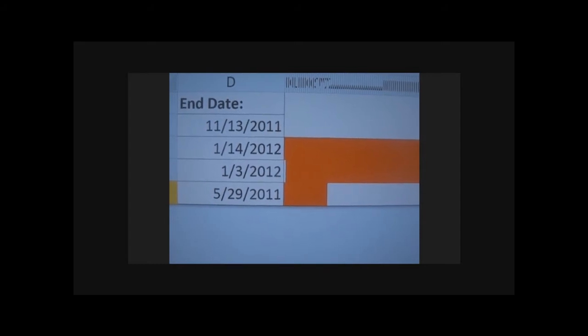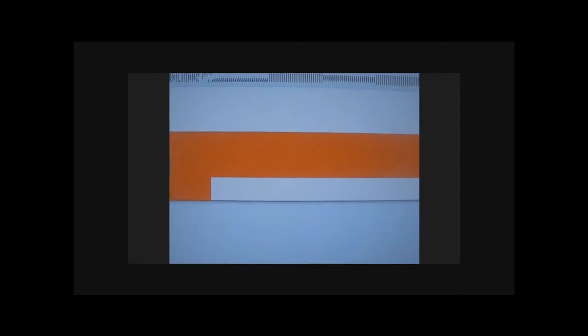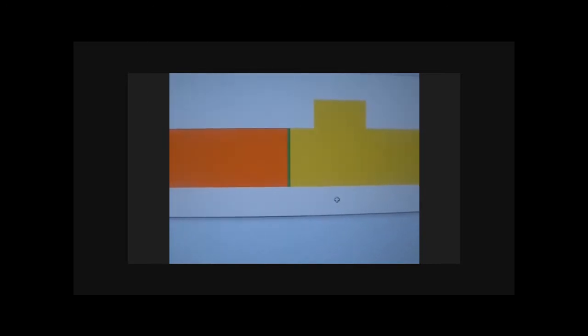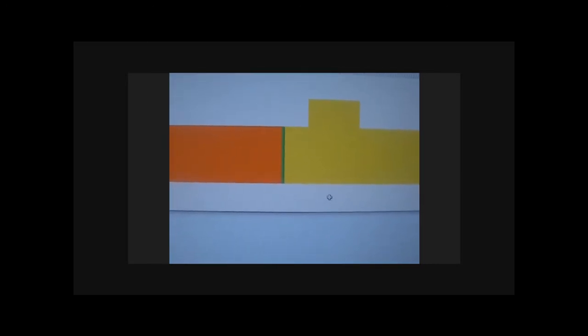When I change those, the coding in the tracker view screen changes. The orange represents past time in the project. That small green line represents today's date, and the yellow represents time that's still on the project.